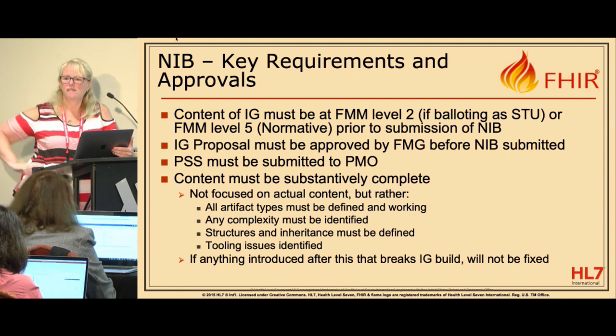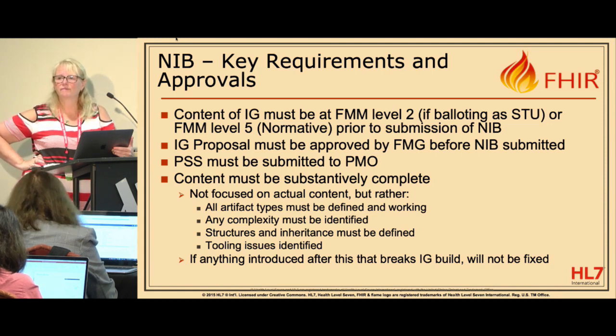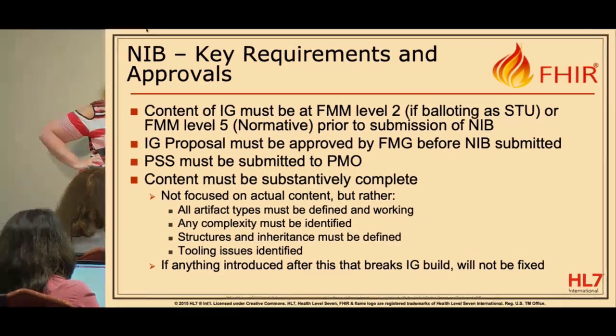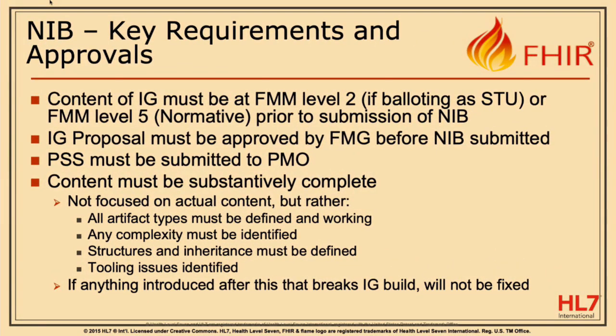So the PSS, as soon as you have an inkling that we're going to do work in this space, you should be starting your PSS. Right. PSS should be at least 6 months before you're planning to ballot. PSS is you're going to do work. Well, that's intentional. We do not want people showing up with content and saying, we'd like to go to ballot next month. If you do that, it puts other things in place.